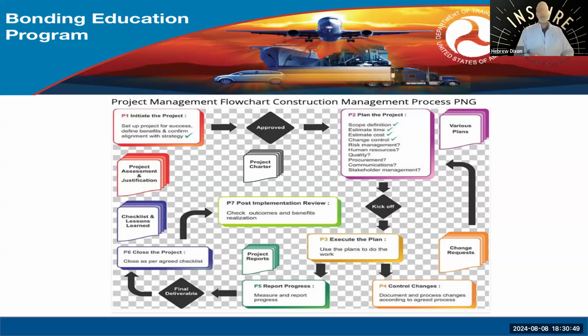But the general cost it takes to run your project could be something like, wow, we don't have Nextels anymore, but that was a thing back in the day. You had two different types of cell phones, right? Sometimes people put dumpster costs in general conditions, so they don't put dumpster costs in Division 1 in the site work. Anything you could think about running a project, you would put in general conditions, and you would make a list of those. That's a great question. So you want to make sure you got all those things covered.